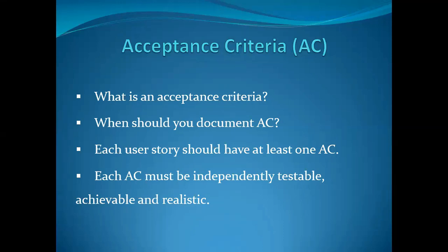But definitely I would still say you need to make sure you have sign off on that acceptance criteria from the stakeholder, and then you send it to the supplier or the developer. Even your acceptance criteria, the software tester, the quality engineer, that's what they're going to use as well. It will help them to write their test cases.